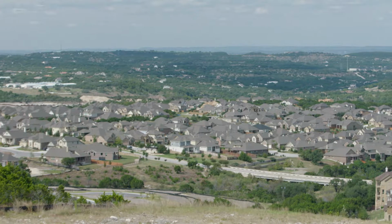We decided that we needed to look at some alternatives and did a plan that laid it out doing all-terrain sewer for the entire project. And then we did cost estimates for both of those plans, and the all-terrain sewer was much more cost efficient because we did away with the deep sewer cuts, some of which would have exceeded 20 feet, and we eliminated all but one wastewater lift station.